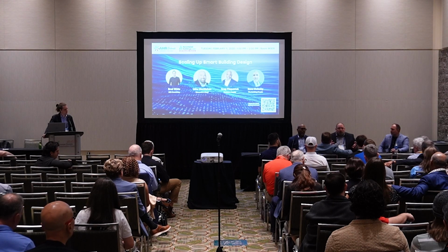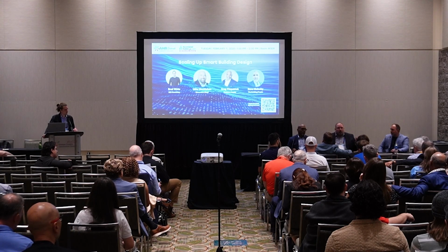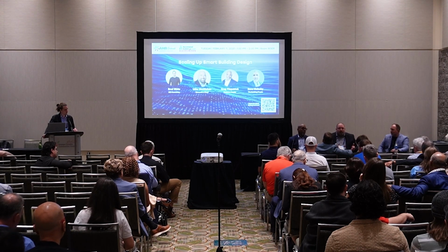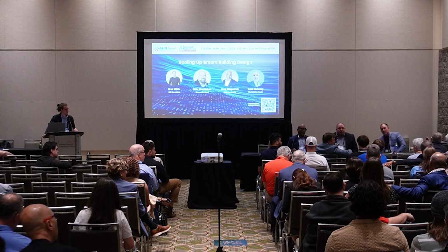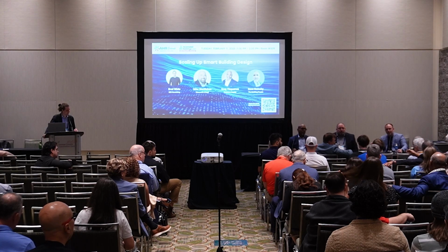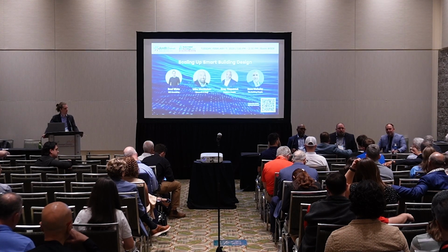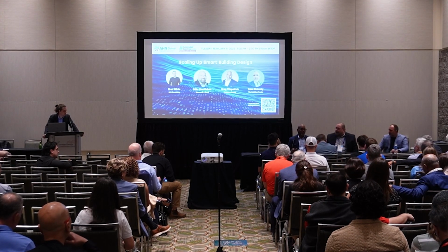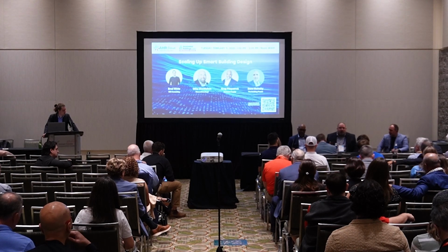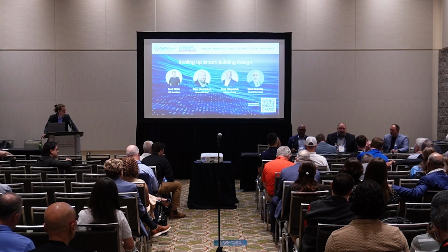We have a commissioning group too, and we're marrying our studios together to figure out that line of demarcation. They test the system, we test the overall, right? Because it needs to be. You have to have that holistic viewpoint. I've never seen a commissioning agent check the alarms that go to the departments, the individuals, et cetera, and produce the necessary reports that are required when you have a fully integrated system. It starts from the commissioning scope, issued by the owner, and it needs to be early on in the process because I don't want to check 1,000 widgets after they're installed. I want to check the first 10, the 10%, next 100, right?